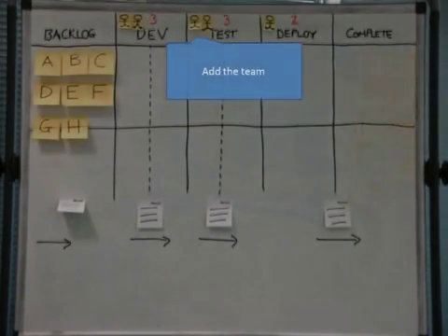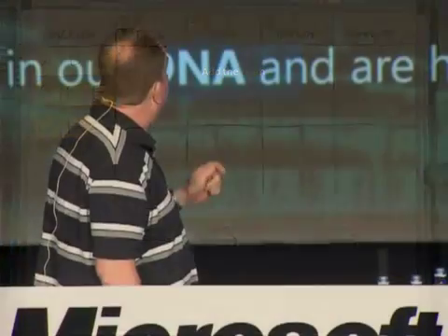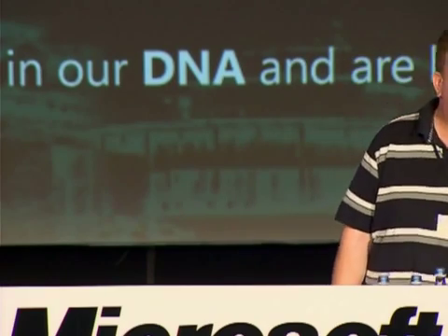And it's done. So the next bit is really to add the team. So we didn't really see how many devs and testers we've got there. So we've got the team. We've got 2 developers, 2 testers, and a deployment engineer. A good starting WIP limit is number of people doing that activity times 2, because they might want to switch a little bit between work. And then minus 1. And the reason that you do minus 1, it tends to promote collaboration.